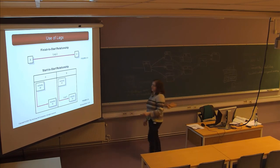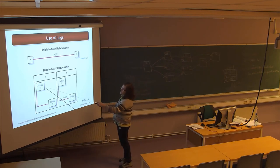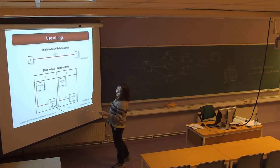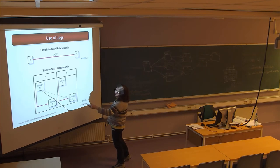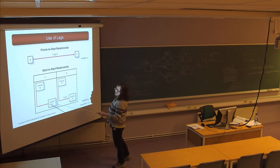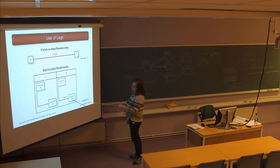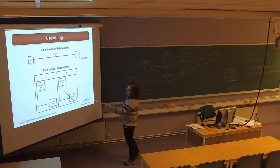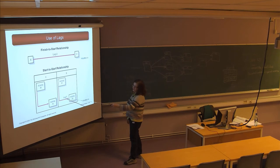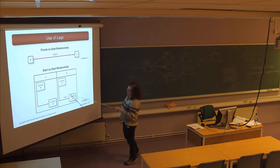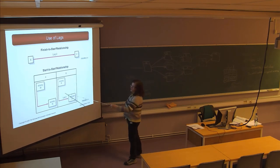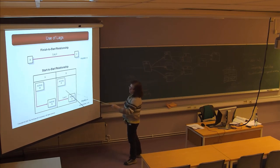In a start-to-start relationship with a lag, if activity Q must wait for activity P to start with a lag of five days, then Q cannot start until five days after P starts. This is a start-to-start relationship — when P starts, five days later Q can start. In a finish-to-start relationship, the first activity has to finish before the next one can start.